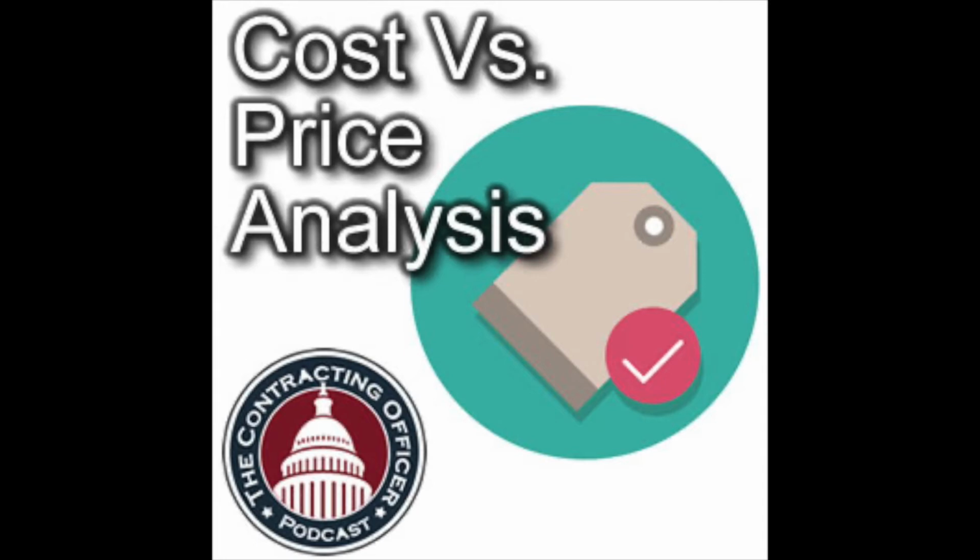One more I want to talk about before we get out of this. We're stuck in FAR mode here. Another technique is the use of parametric estimating methods or the application of rough yardsticks, such as dollars per pound or per horsepower or other units. Actually, it says rough yardsticks in the FAR. That's just funny. Yeah, that's good stuff.